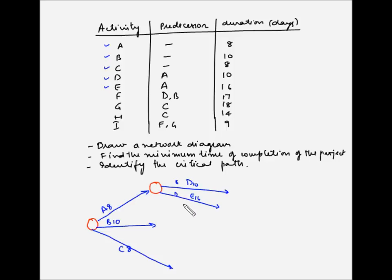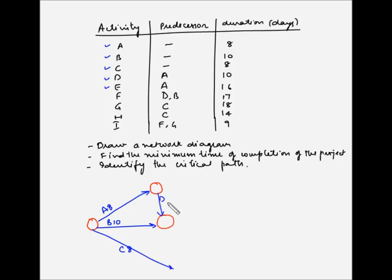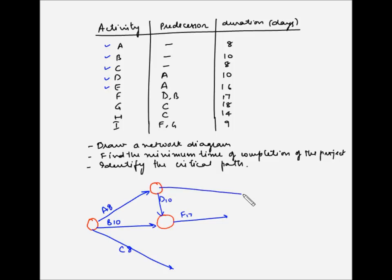Let me redraw the diagram. I'll draw a node here, and from this node draw D which takes 10 days. Since F is dependent on D and B, from this node I can draw F which takes 17 days. And I'll draw E here, which takes 16 days. So we have completed F.